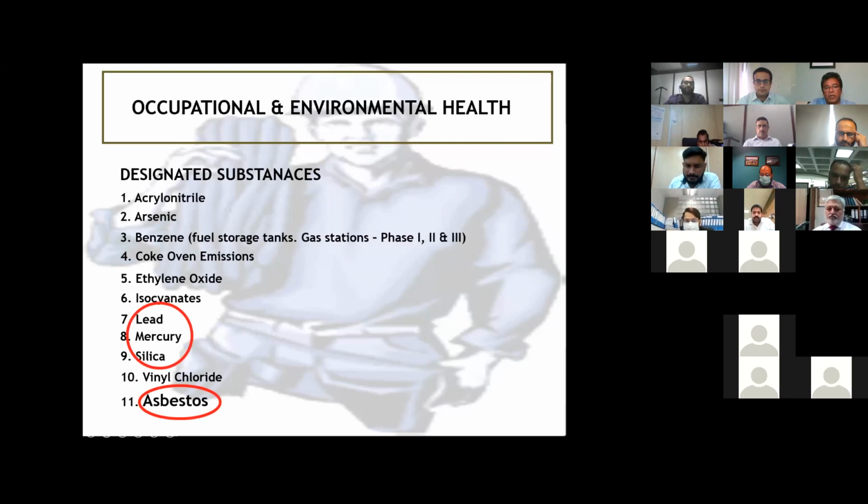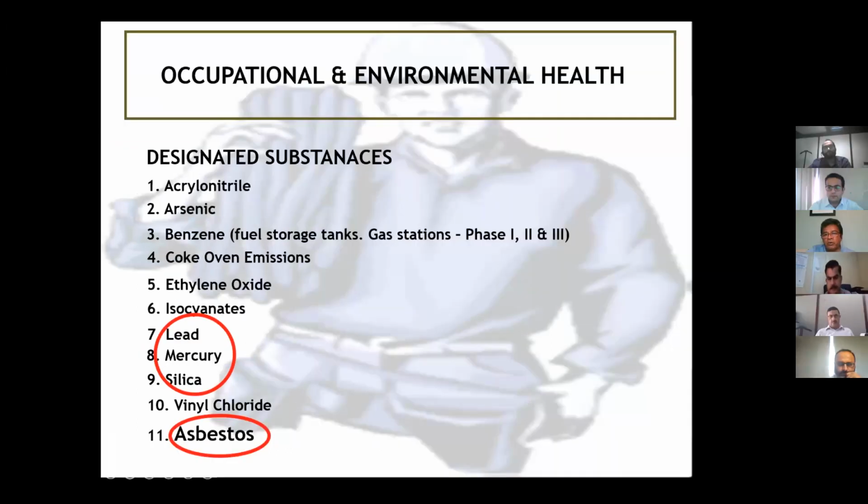My role at the university is basically that of an in-house consultant. The regulations about designated substances are very strict. We have to have a report at tender stage. Whenever the project is sent out for tender, a detailed report on designated substances has to be part of the tender.